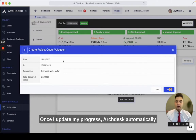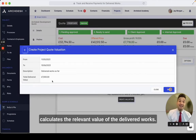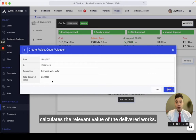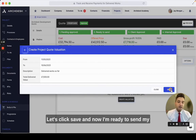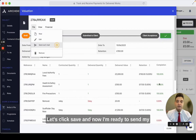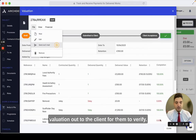Once I update my progress, ArcDesk automatically calculates the relevant value of the delivered works — in this case, 7,000. Let's click save. And now I'm ready to send my valuation out to the client for them to verify.